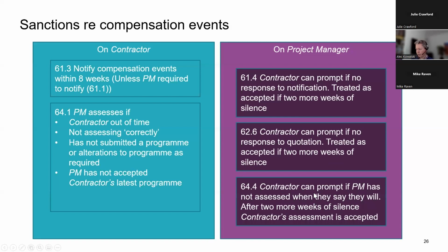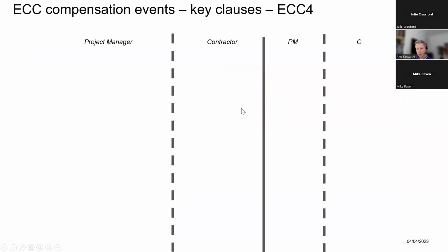And finally, if you said you're going to do an assessment and you don't do it within the time that you're supposed to, they can remind you. You've got 2 more weeks to do your assessment. If you still don't, it reverts back to their quotation and that's treated as accepted. Let's look at these timescales